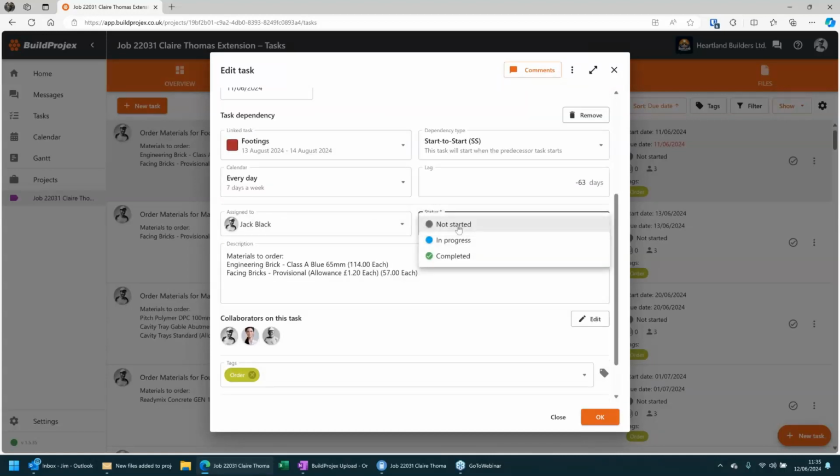Okay, so there's a status of not started, in progress, or completed. So it will give you the option to delete anything that isn't started, or you can delete everything, things that are completed, things that haven't been started, or I think anything in the future. So anything existing will remain, but anything future that nobody should have done anything to yet.